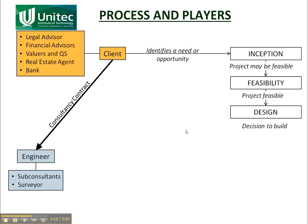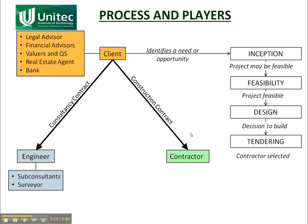If he does want to proceed, then the next step is to find someone to do the work, and that is what the tendering process is all about — finding a contractor that can do the job, has the skills and expertise to do it, and is going to do it for the right price. At the end of the tendering process, there should be a construction contract between the client and the contractor.